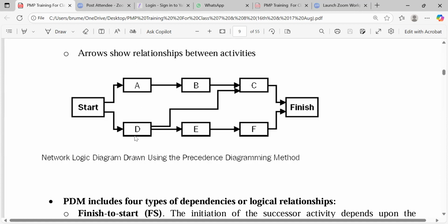So that is to say that when I come to start A, I may delay D and wait for A to finish its 4 days. Then when I want to start B, I go and start D. Because D is 4 days, B is 4 days. So at that time, B can finish in 4 days, D can finish in 4 days, and immediately C will continue. Nothing is spoiled. The critical path is still the critical path, which means D has a playing time of 4 days.